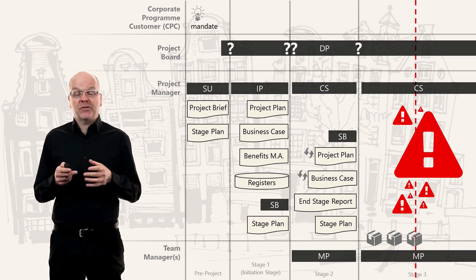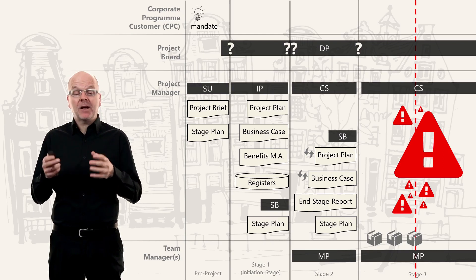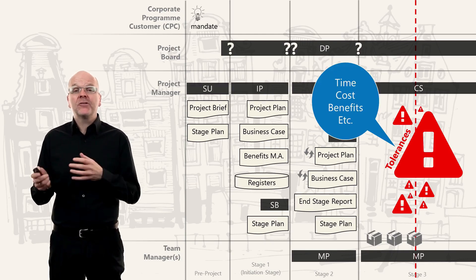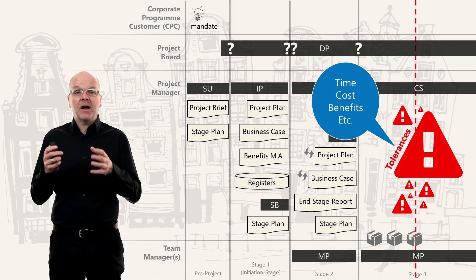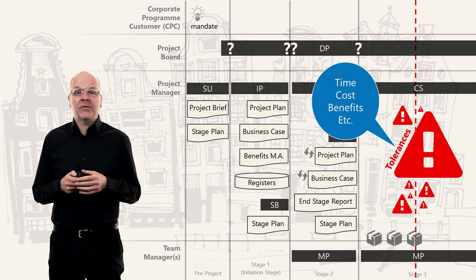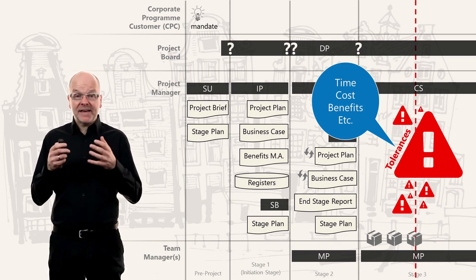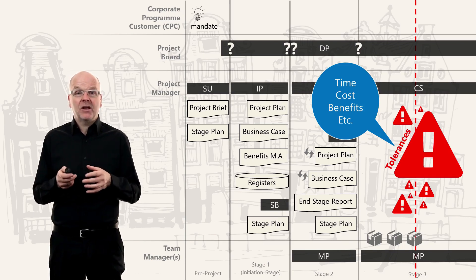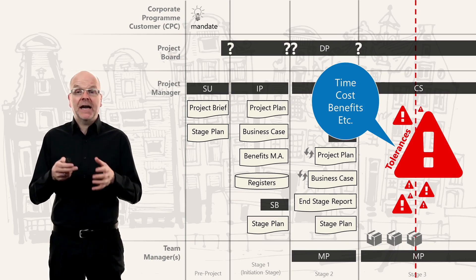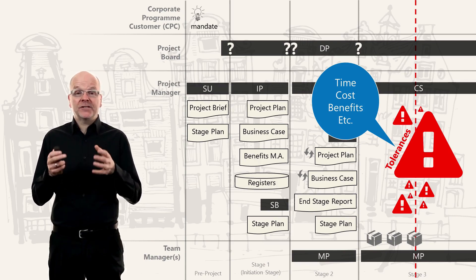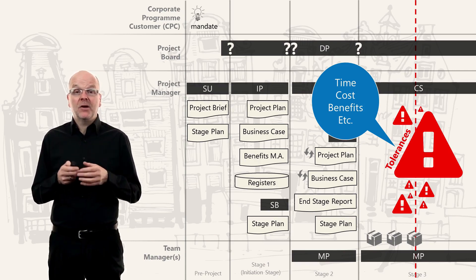We have tolerances for time, costs, and benefits — there are three more as well, but these are much less common. The project board will set tolerances for the stage for time, costs, and benefits. For example, they can set a cost tolerance of 10 percent.